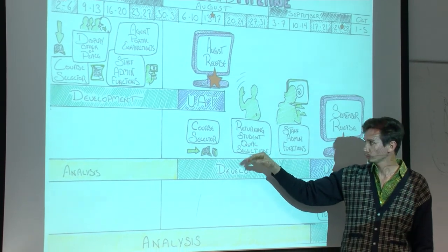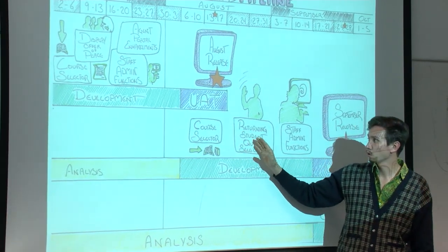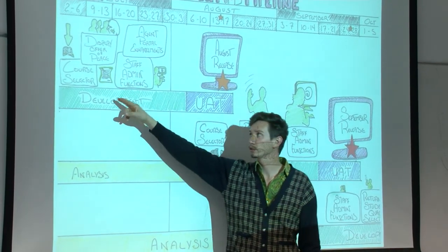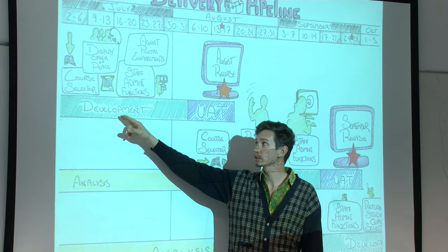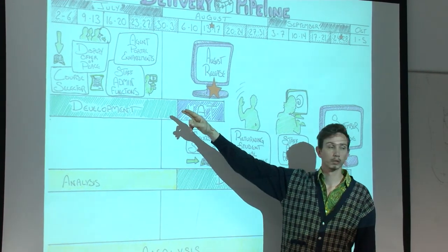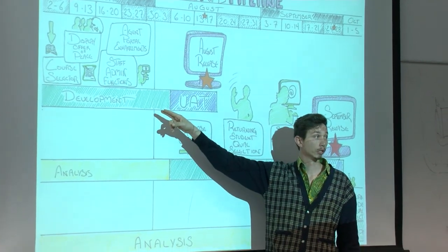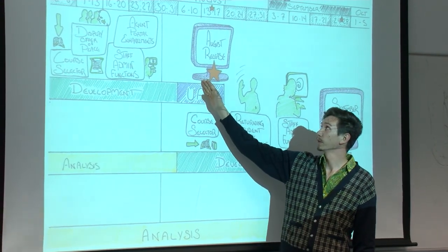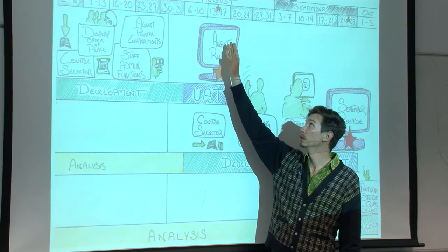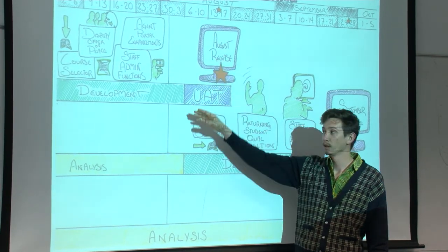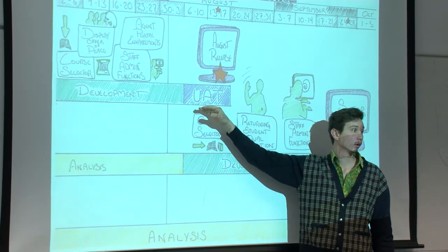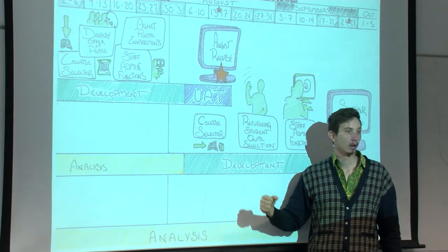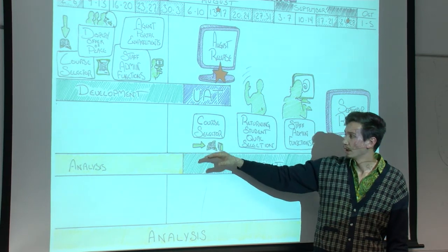So while we're thinking about that, we're also analyzing the other things that we need to do for returning student, being able to choose their qual. But there will also be more course selector work. So we won't be able to do everything for the course selector in August. But what we are going to do is put enhancements on the MVP that we've already created. Remember, that's minimum viable product. And test with the academic managers sometime here in early August, which kind of de-risks our delivery in September for the October kind of rush.